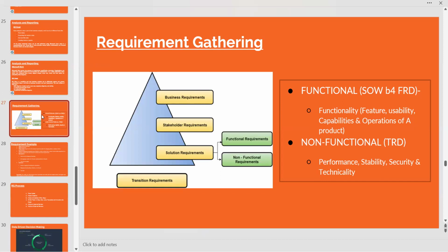So the customer shares a requirement with one of your development team members, or maybe a BA. First of all, nobody gives an upfront yes or no to the customer before discussion. It's always, okay, let me get back to you on this. Let me have an internal discussion on this. Always, guys, this is a thumb rule, okay? Any new requirement which you feel is outside the scope, yes.